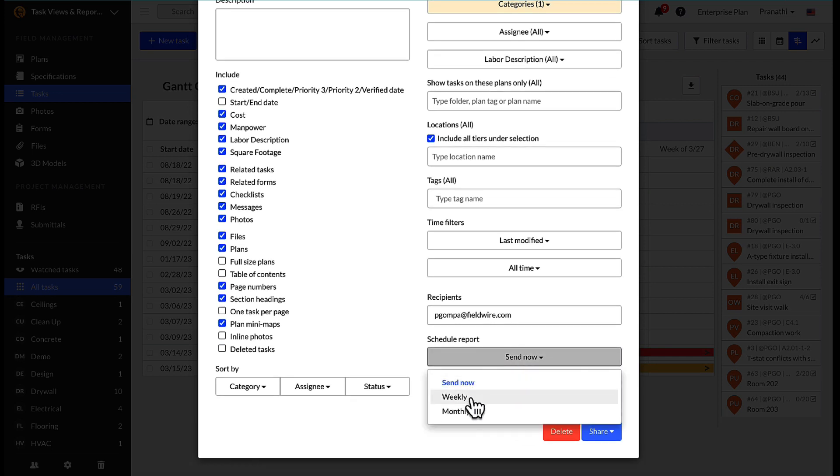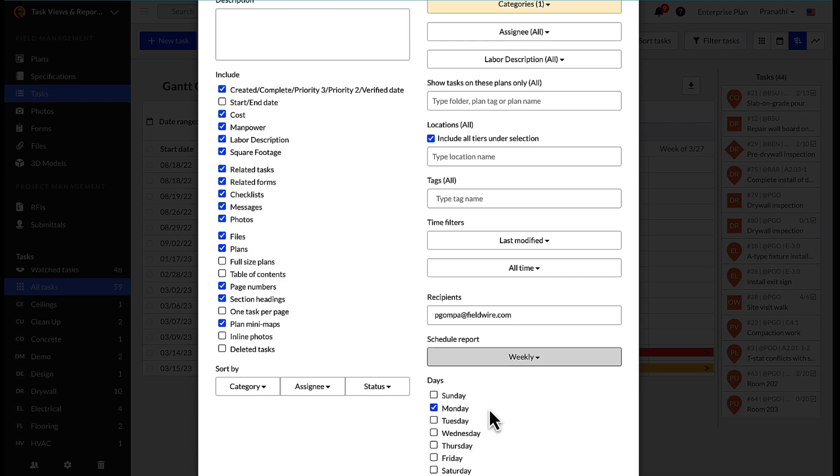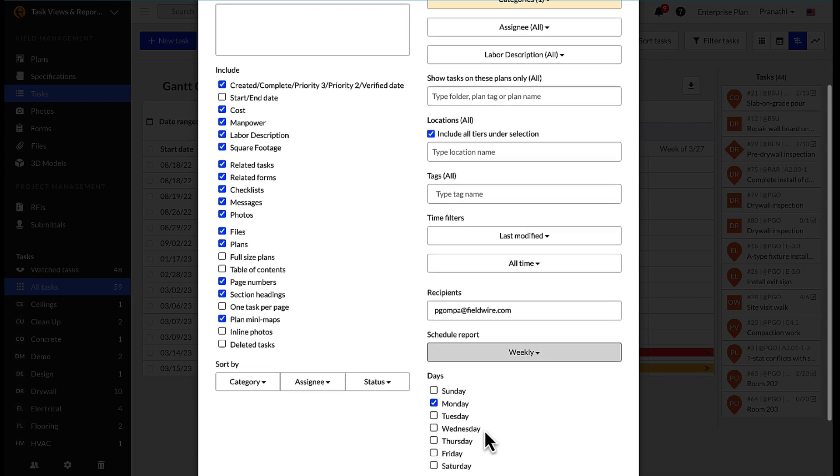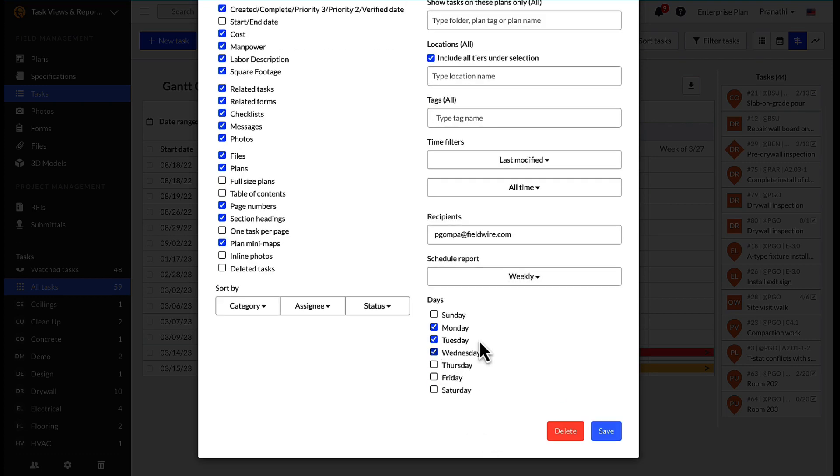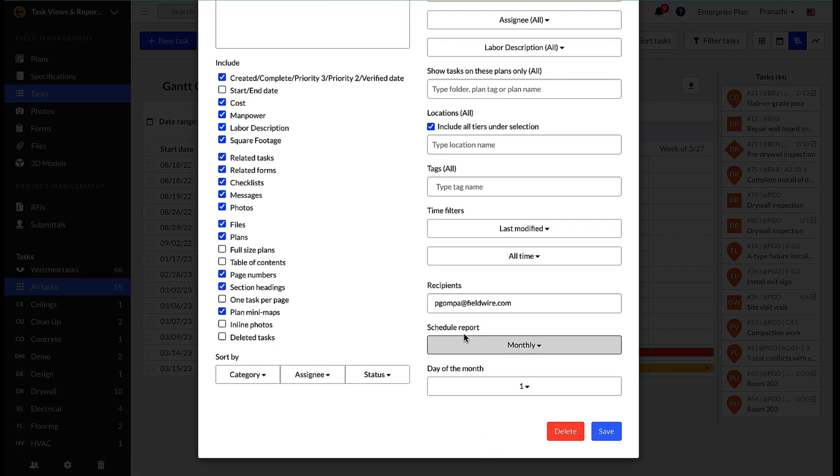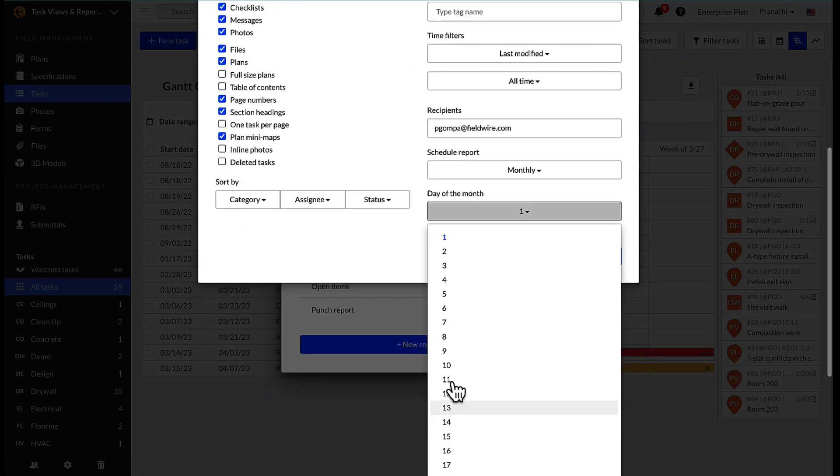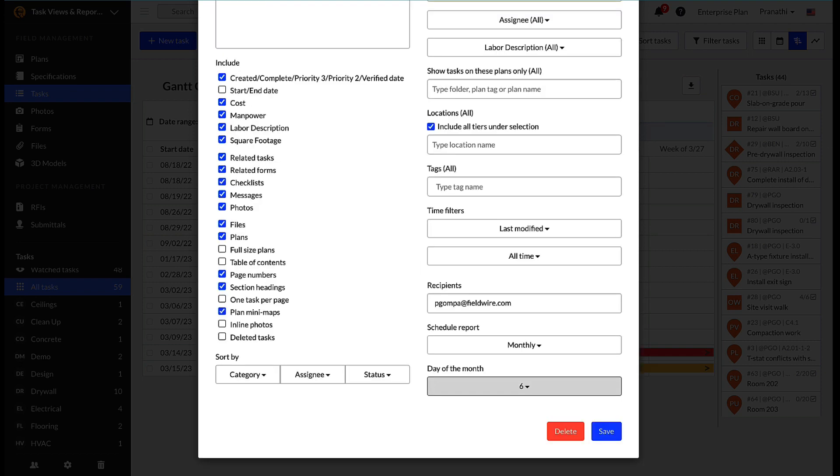Automation of reports is also available, allowing you to either send a report now or specify the frequency of your report, whether weekly, three times a week, monthly, etc. This can be great for monthly progress meetings with the owner, weekly subcontractor meetings, or just for clear communication on progress across teams.